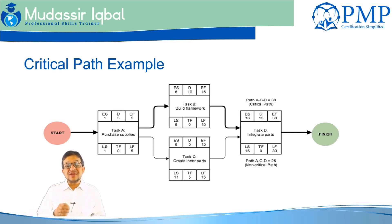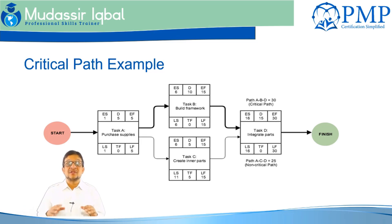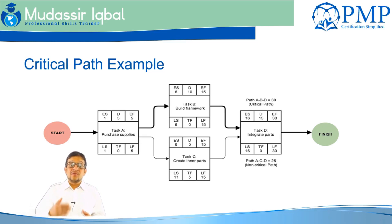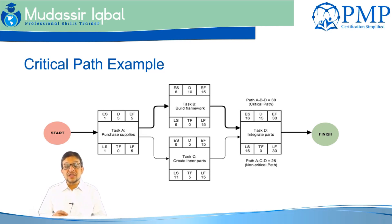The critical path is used to determine which activities have the least amount of float — typically zero float. We might have some negative float on a critical path, but if we have float on every path it means we can delay the project for some time. We may have a constraint such as 'not start earlier than' for some activity, which means if there is float in between, we can delay that activity a little bit to minimize the project timeline.